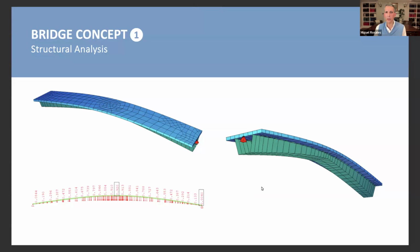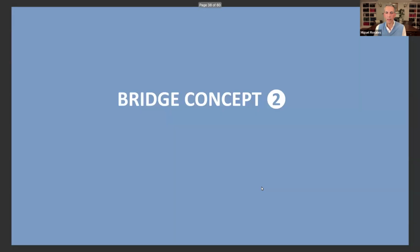These are some of the structural calculations we already have done. We did all of this because we wanted to make sure that we had a good cost estimate. So all of the quantities of materials, the concrete, the foundation, the steel box, was all calculated, and that's why we're able to get to the budget that we feel comfortable will be within the $1.2 million range.